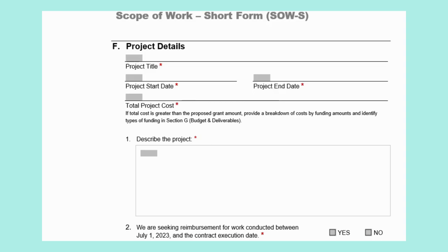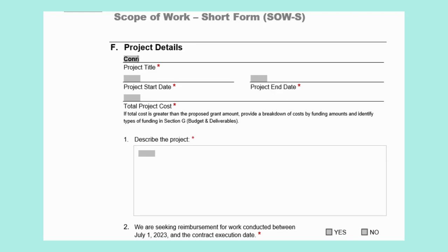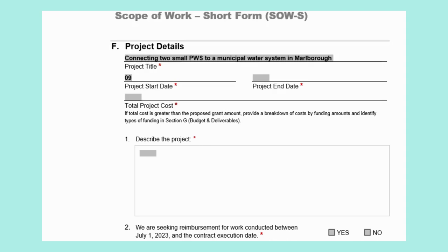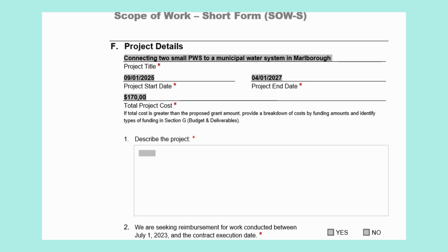For this section, you will need to complete the questions with information specific to your project. First, please enter the project title. Then you will include your project start date and end date — please use a 2-digit month, 2-digit day, and 4-digit year format. Our project title is 'Connecting two small PWSs to the municipal water system in Marlborough.' Our start date will be September 1, 2025, and the end date will be April 1, 2027. Include the project cost here as well — our project cost is $170,000, which is also the proposed grant amount.